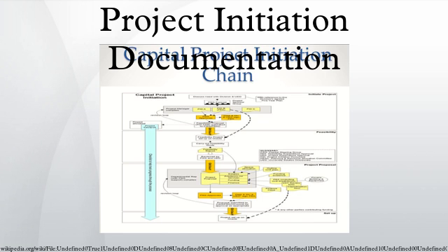It is assembled from a series of other documents, including the business case, the terms of reference, the communication plan, the risk register, the project tolerances, the project plan, and any specific project controls or inspections as part of a departmental quality plan or common project approach. The PID represents a detailed version of the basic project startup document called the project brief. The PID bundles together documentation to form the logical document that brings together all of the key information needed to start and run the project on a sound basis.